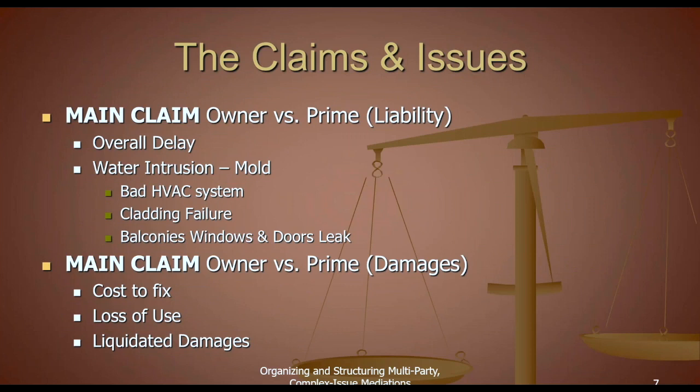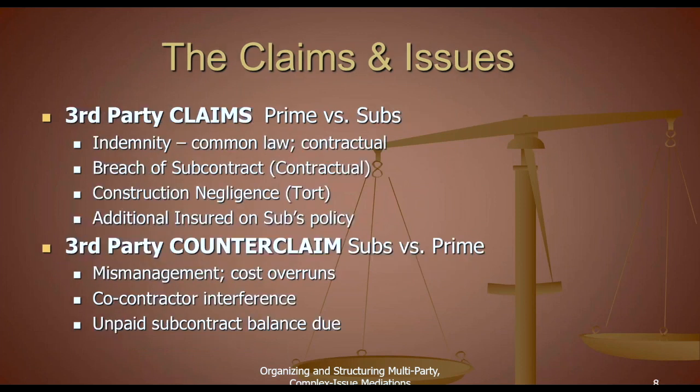And then you can branch into looking at, okay, what are the claims and the issues that have popped up? I don't want to resolve the claims at this point. I just want to understand what they are. Well, it turns out the project's late, it's over budget, the building's leaking like a sieve, the cluster bombs start flying around. We've got overall delays happening, damages being incurred, water intrusion everywhere, mold, bad HVAC, air not circulating, condensation settling in, site drainage is bad, balconies, windows, and doors leak. Damages, we've got cost to fix, loss of use, lost sales, rentals, property damage, liquidated damages, and then, of course, there's the defenses that have popped up. What are they saying right back?